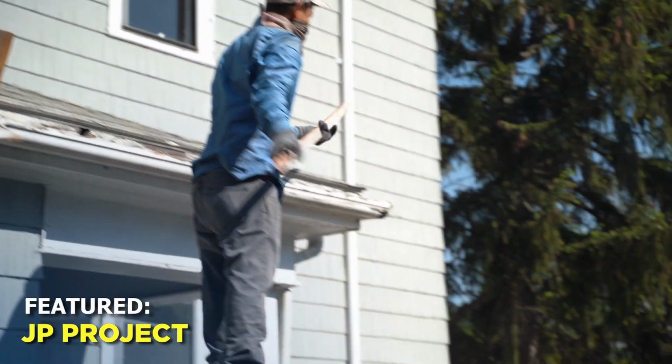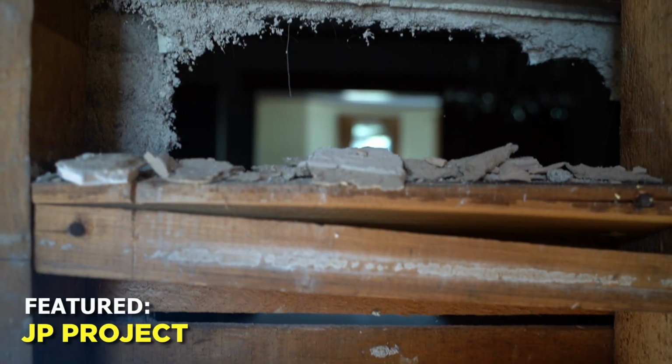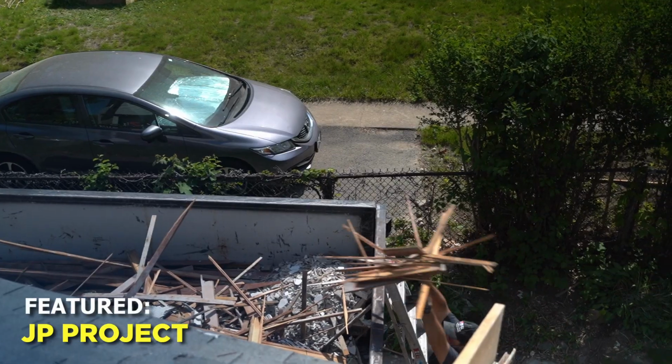So that's one problem. But the main thing for you guys is to really understand from day one a good understanding of how much you're going to spend. It's going to be a challenge. You're going to get better and better with each project, but I think the best way is to have an itemized list for each thing you're going to repair. For us, typically, we come in the living room or kitchen, we look around and we say, okay, first we got cleanup. We kind of have an idea if it's going to cost us $2,000 or $10,000 to clean up a place, depending on how much junk it is. I think here we spent about $4,000 removing all the trash, getting the dumpsters and all that stuff.